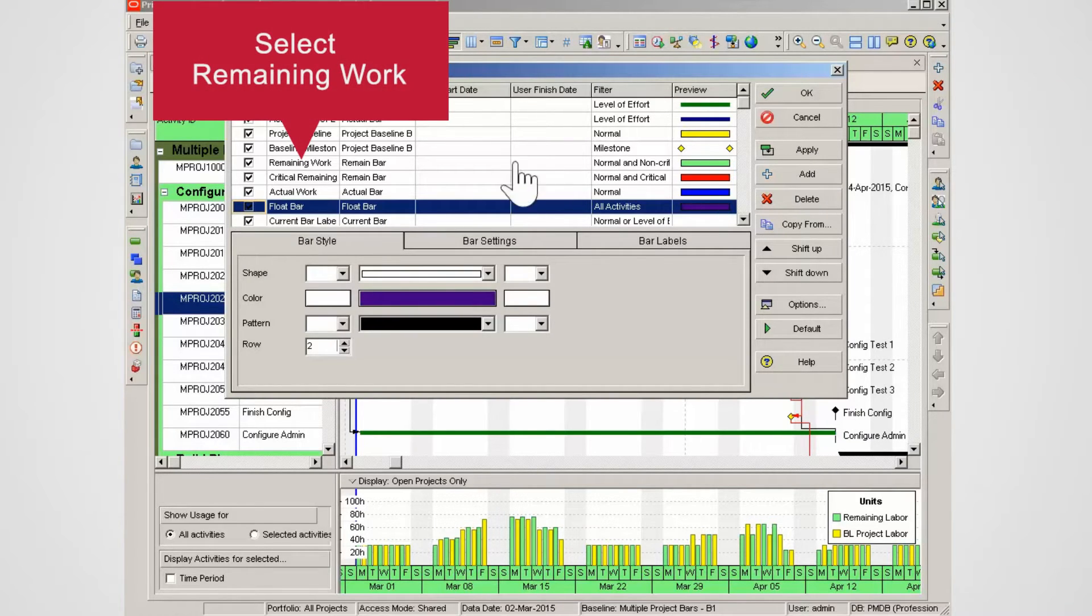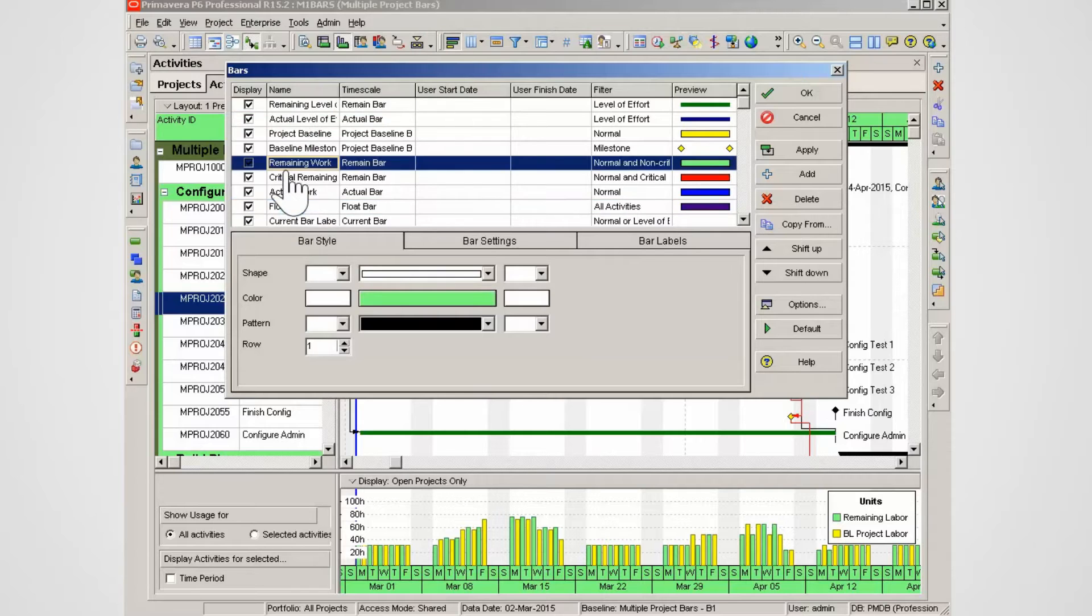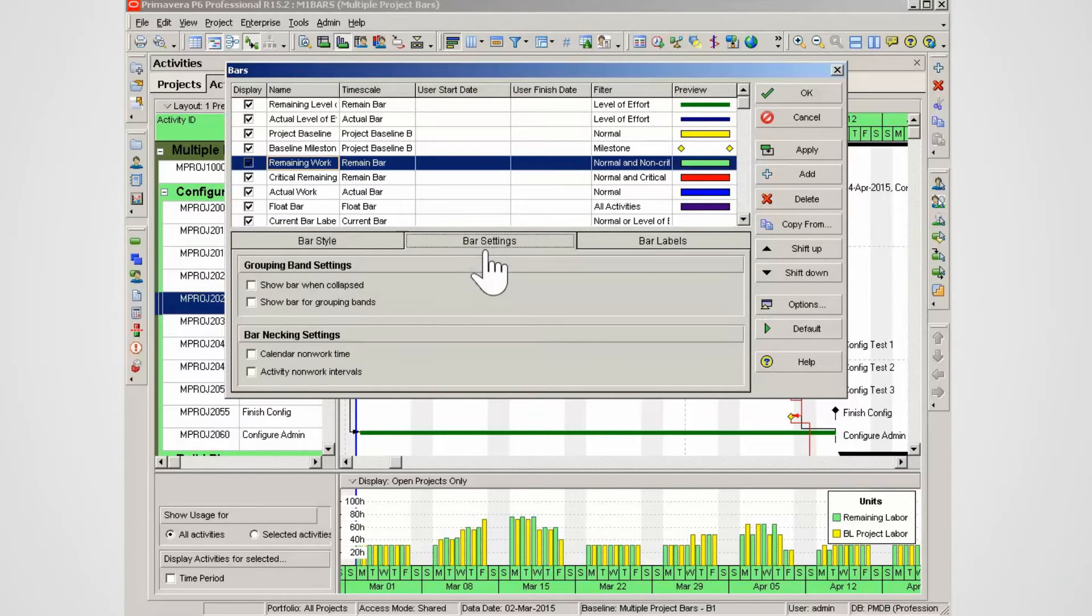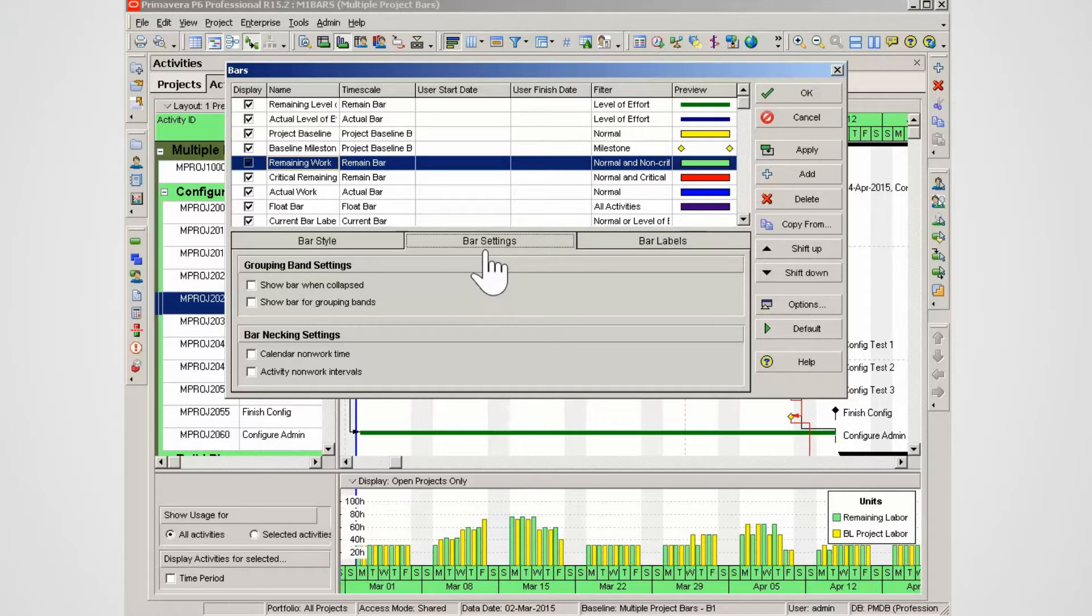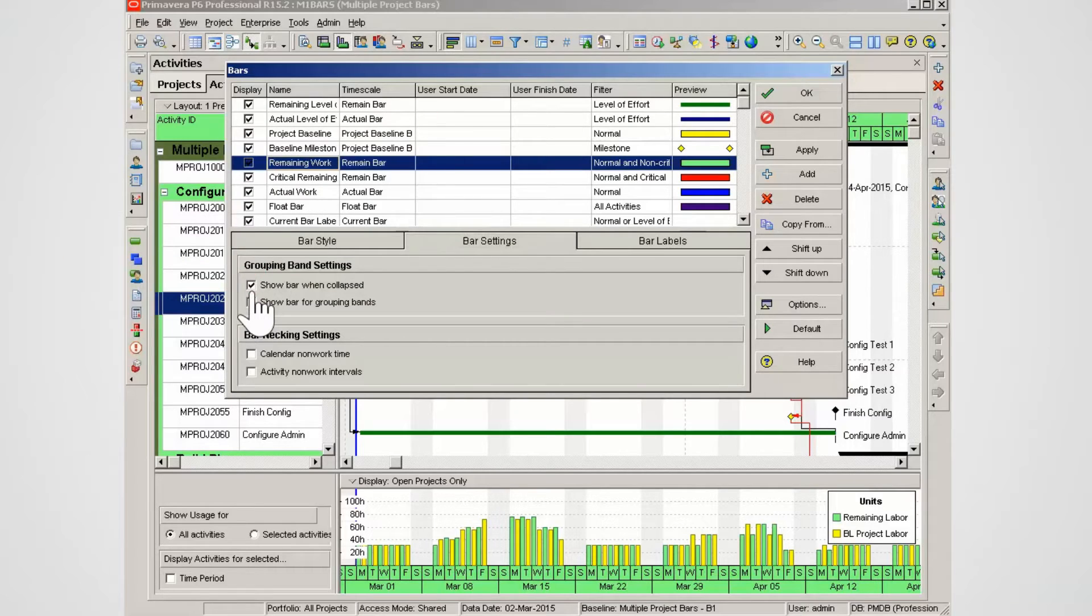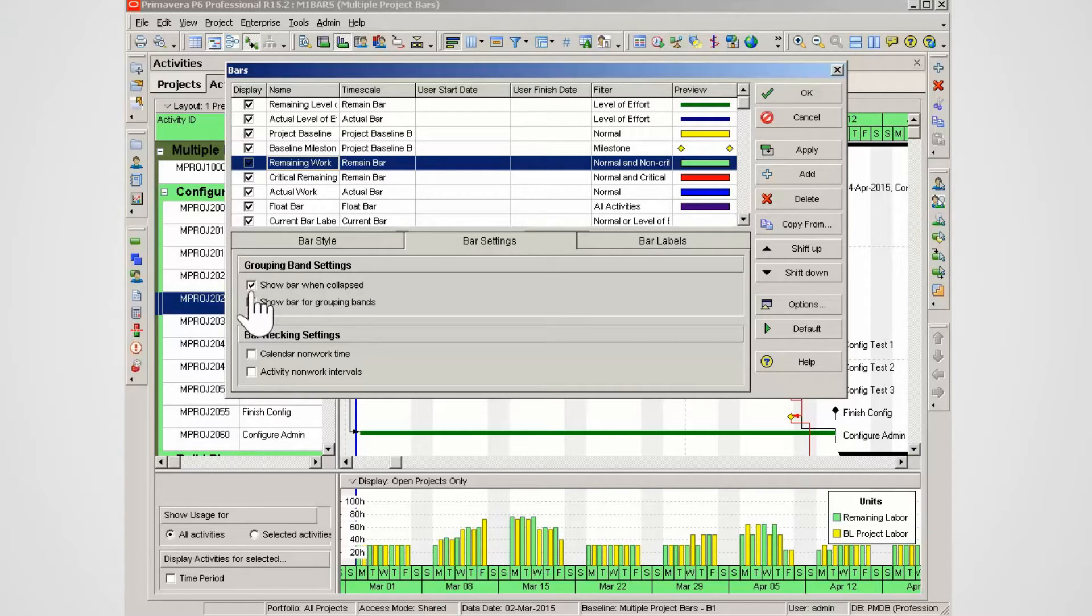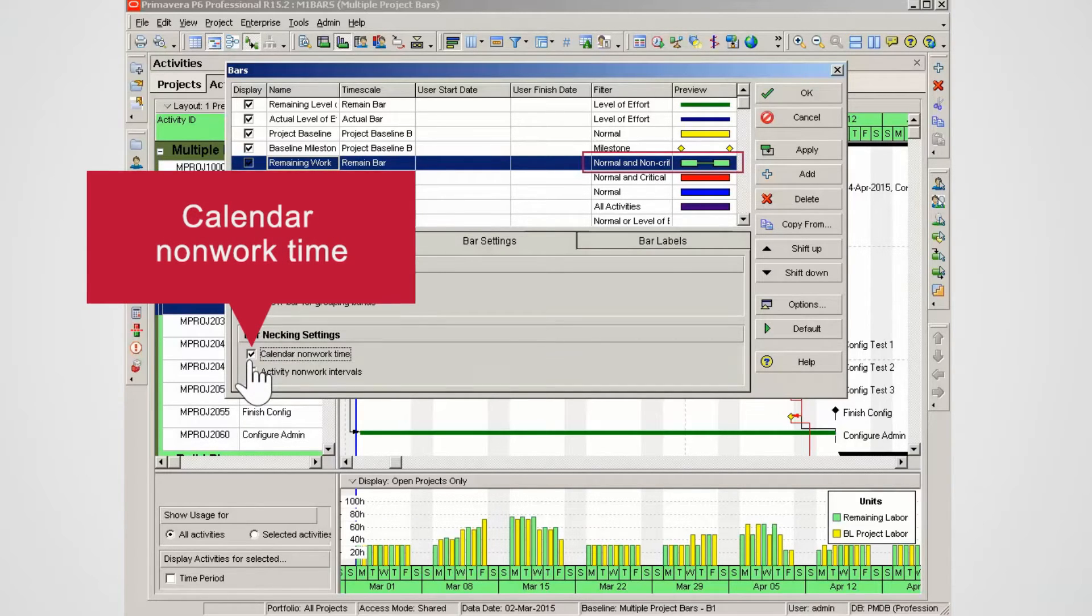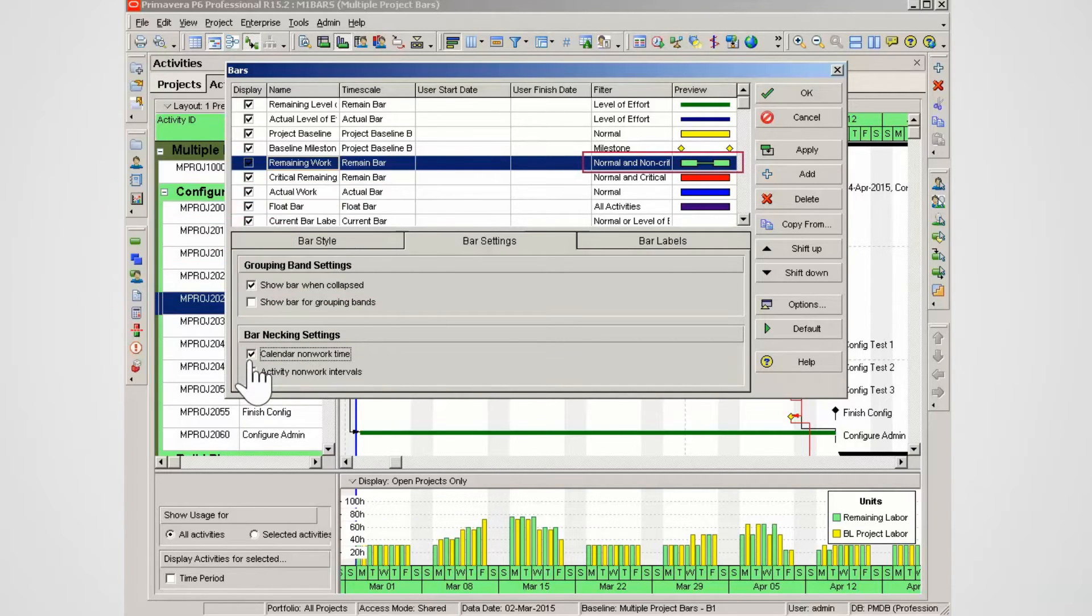Select the remaining work bar. Select the bar settings tab. The grouping bar bands can be set to show bars when collapsed. Set show bars when collapsed. Note bar necking settings can be used to show calendar non-work time. Check calendar non-work time. Note how the remaining bar profile changes.